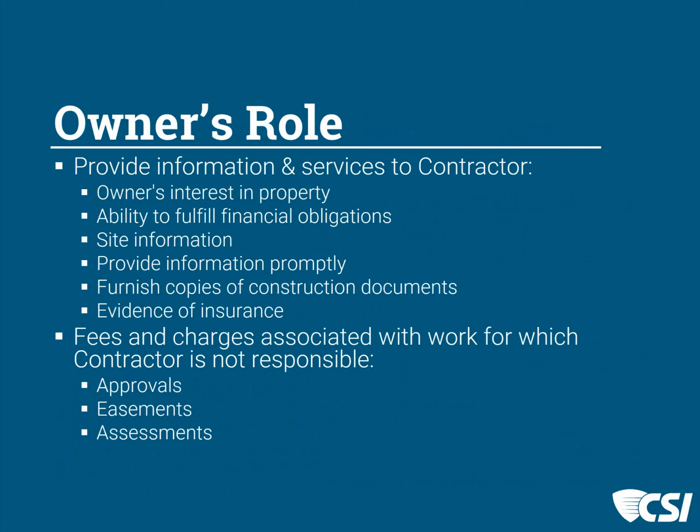So there are some assurances that are an important part of the owner's role early in the project. And if there are fees or if there are approvals that needed to be obtained before construction started, whether they were easements or whether assessments were paid, these are things that the owner needs to have taken care of clearly before the work begins.